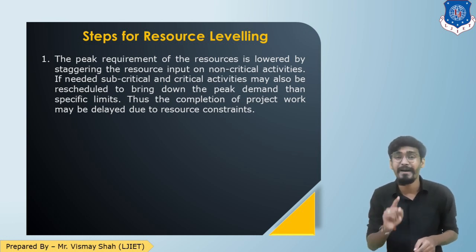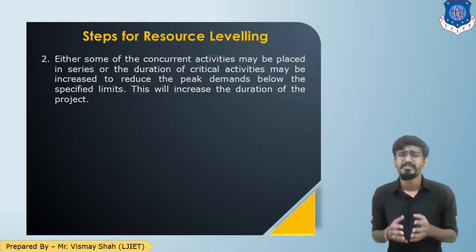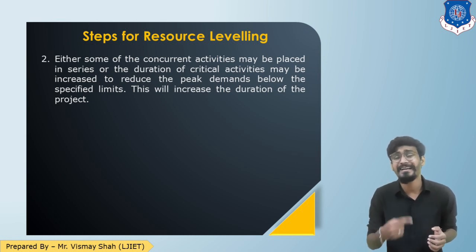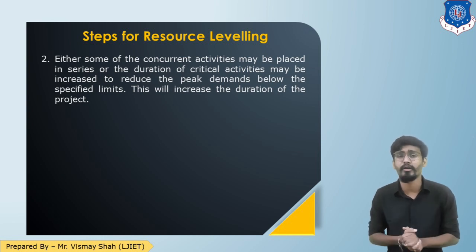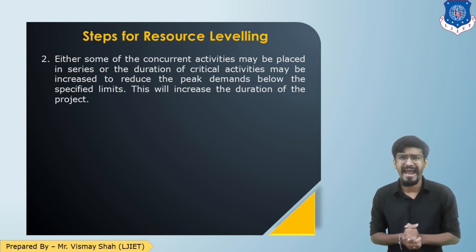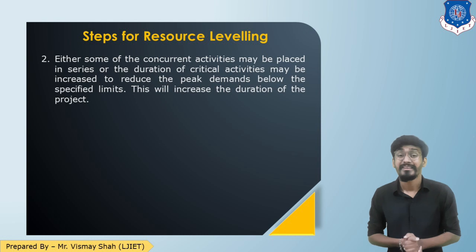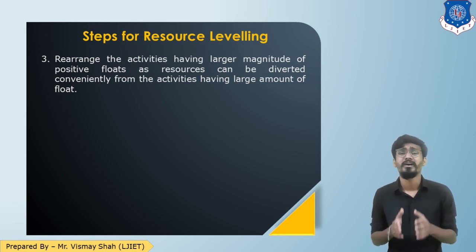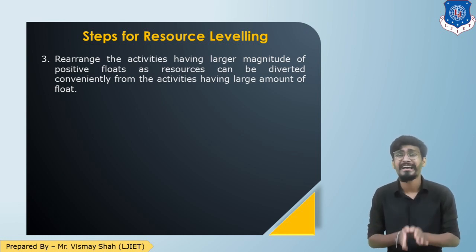Step two: either some of the concurrent activities may be placed in series, or some of the critical activities are delayed to adjust or lower the peak requirement of the resources — and this will increase the time duration. Step three: rearrange the activities having a larger amount of float. That is the step-by-step process for resource leveling.